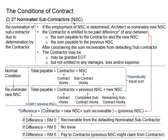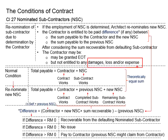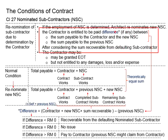However, the original NSC is in default. This shall lead to damage, loss, or expenses as a result of his default. Whichever damage, loss, and expenses are incurred, the contractor should be able to claim from the defaulting nominated subcontractor. This is because the original nominated subcontractor is liable to the contractor. This statement is talking about the differences.